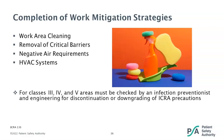Now, onto the completion of work phase. The construction work may all be done, but our work in infection prevention is not. During this phase, the goal is to ensure any mitigation strategies that were put into place are safely removed, and the area is cleaned and ready for residents and staff to utilize. During this time, work area cleaning will take place, any critical barriers will be removed, the function of any required negative air will be checked, and HVAC systems will be ensured to be in working order. If the project was found to be class three, four, or five, the area must be checked by an infection preventionist and engineering before any ICRA precautions can be downgraded or discontinued.